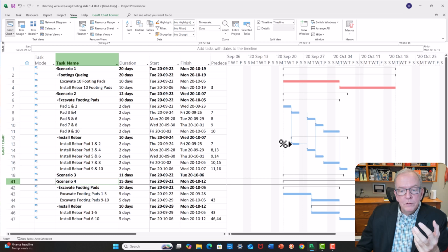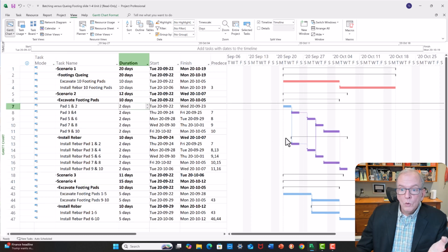What's going to happen if you use this methodology? When are you going to find out? You're going to find out after you do 2. The feedback's going to come back and it's going to basically say after 2, what's going on here, right? So this is the driver here, right? For these other ones. You're going to find out after you finish those 2 that basically they weren't deep enough. So how many you got to fix?